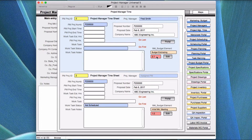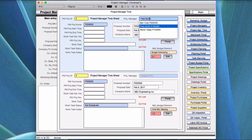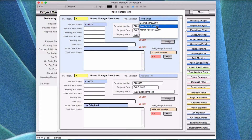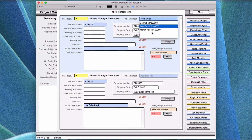The schedule ID number and the person in here — up at the very top is the project manager for that particular work job. In this case there's a conflict in his time because he's working on Project 01 but shows up here under a different project. What you need to do is go back and assign him into Project 02 and add him up here in the project managers for Fred Smith, and have him on that project as well. If he's sharing task time, he would re-appear here as Fred Smith with a project ID, which tells you he's spreading his time between the two different projects.